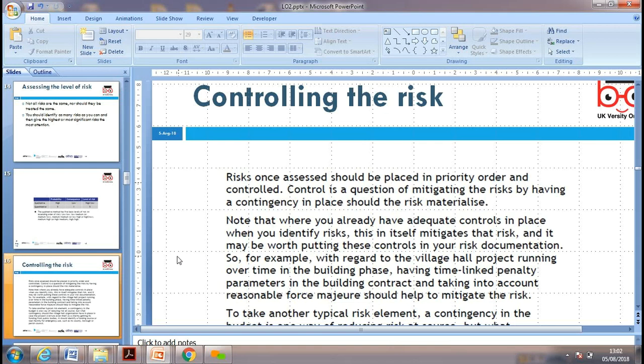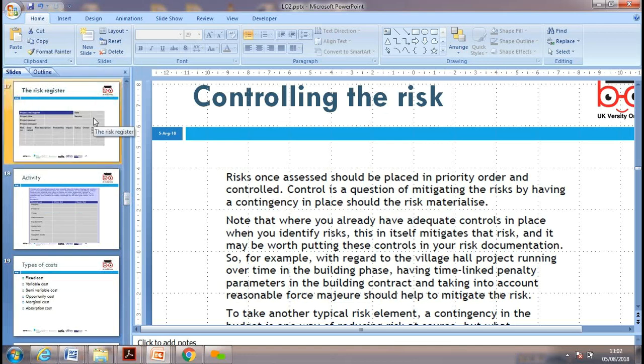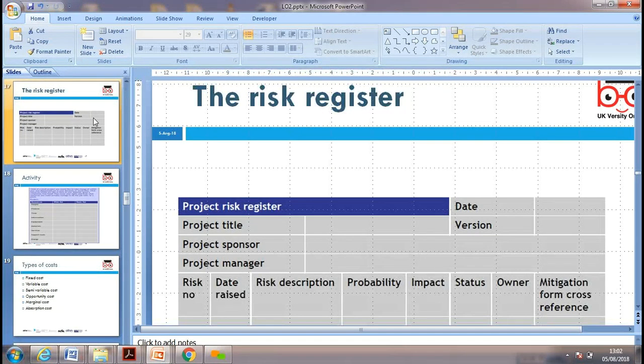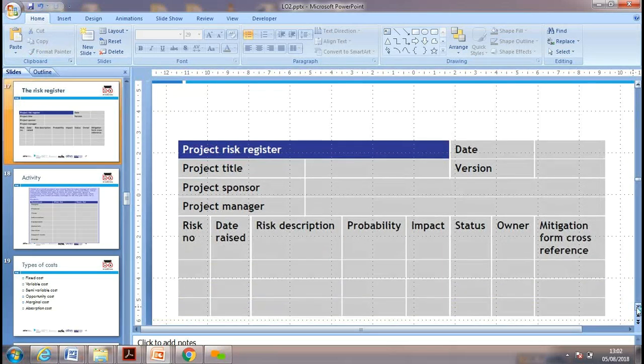So we can draw some parameters. If we have a lot of risk, maybe our investment totally will be lost. So maybe we'll involve local partners to control some of the risk. We can prevent it, so I don't bear all the risk of the business. So there are different ways, and we can look around. In our organization, we can make a risk register. We record every risk.